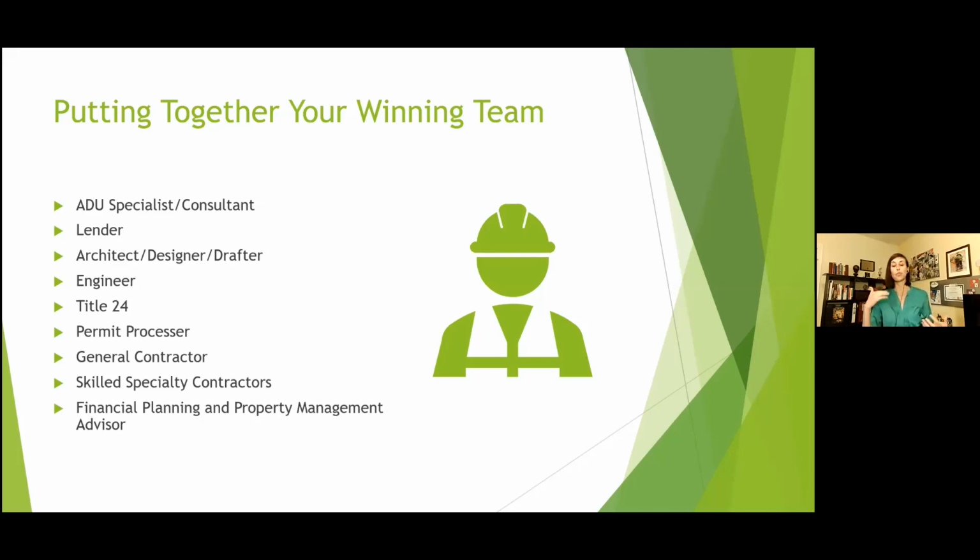So this is why it's really important that, as I've vetted contractors, and I probably talked to a good couple dozen contractors to get the team that I'm working with now, one of the big questions that I'm always asking contractors is about the quality of their subcontractors. How long have they worked with their subs? How much work are they giving their subs? And are they really able to get those subcontractors out quickly and into their schedule to get projects done? Because for most people, time is money. And if your project takes longer because we couldn't access subs to come on board, then that's costing you monthly rent that you could potentially be bringing in on this project.